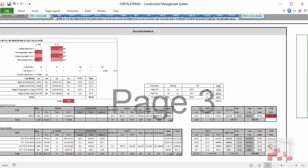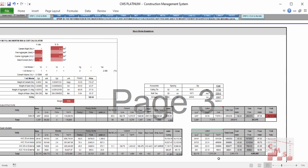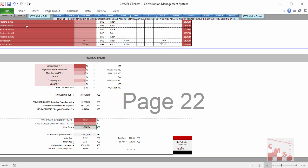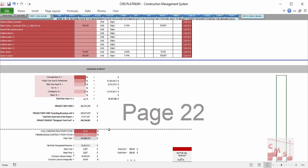You have the full labor cost per cubic meter, the total cost for each activity, the cost per meter for each activity, and the total price after CMS adds the profit ratio for each activity automatically. The same applies for block work — all types, material costs including block, mortar, cement, water, sand, curing, and access equipment are calculated automatically, plus labor cost, total cost per meter for each block type, and the final price after adding the profit ratio. At the end, CMS provides the final budget and final selling price including all direct and indirect costs.